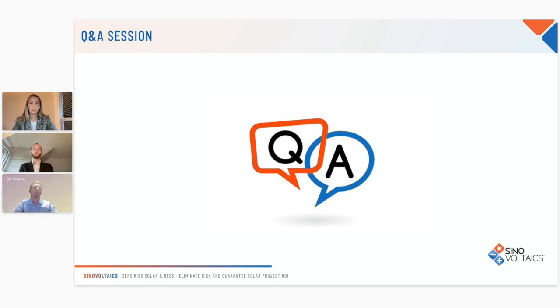Thank you, Edward. We still have a couple of minutes left, so we'll take a couple of questions. I guess a question to you, Arthur, is it recommended to ask for FAT reports from the supplier for all transformers? So the short answer is yes. You need to differentiate where you are in the procurement stage. Before conceptualization, I would ask for the FAT checklist so that you can compare different suppliers and the kind of tests they do. And after, for your own FAT, for your own transformers, for your own projects, I would definitely ask for the FAT reports for each of your transformers.